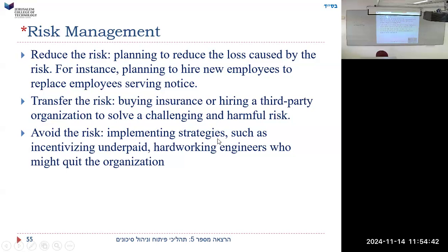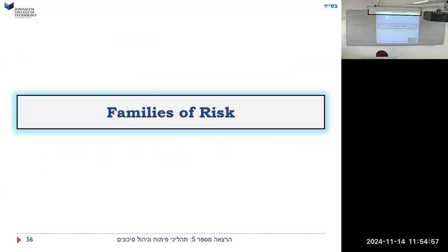Avoid the risk, implementing strategies such as incentivizing underpaid, hardworking engineers who might quit the organization. Just pay them more, or incentivize, give them stock options if they finish the project on time, or more money if they finish it early. And then that will help avoid the risk.